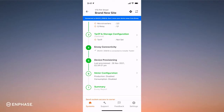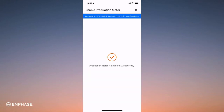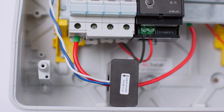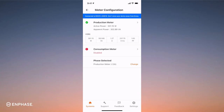We're now in a critical commissioning stage, Stage 6. We need to take extra care here as the app gives us feedback on whether we have correctly connected the CT metering. Select production CTs and the number of phases. Select 'No, I'm an Expert' — you'll bypass the wizard and go straight to the CT commissioning stage. If you're unsure and need more guidance, please select the wizard option. The production CT arrows point away from the solar. If you have incorrect CT readings, you may not be able to complete commissioning successfully. The CT is showing power, VA, current, AC voltage and power factor. I have two microinverters so I can confirm the current and power reading match what I expect to see. Also check — is the reading positive or negative? If it is negative, recheck the connections and CT wiring. Also refer to the Enphase CT Tech Brief located on the Enphase website for more information.